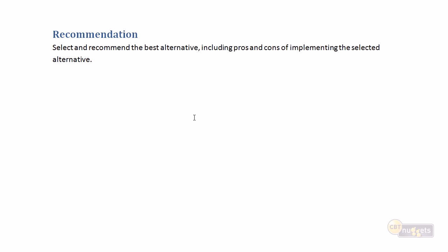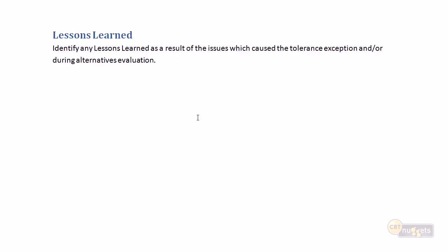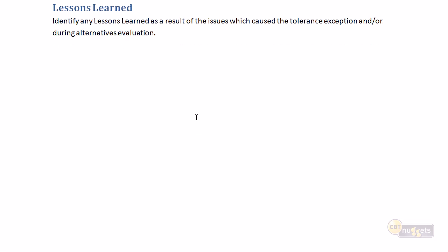And that leads to our next piece, which is the recommendation. Select and recommend the best option, presumably based on our numerical analysis, but be sure to include the pros and cons of implementing the selected alternative. Just because it ranked the highest doesn't mean it's without its own challenges. So make sure we're calling out and making clear all of the challenges we're going to have with implementing our recommended solution. And then finally, we're going to summarize any specific lessons learned as a result of doing all of this work so that we can improve our corporate best practices, and we certainly can improve our project delivery situation.